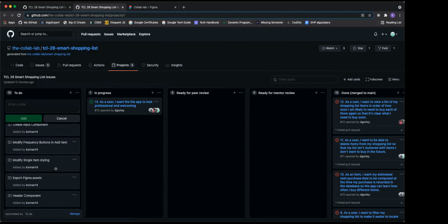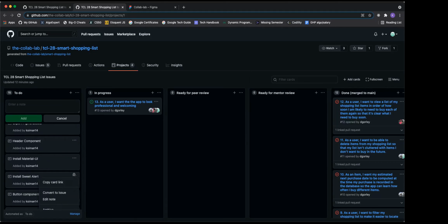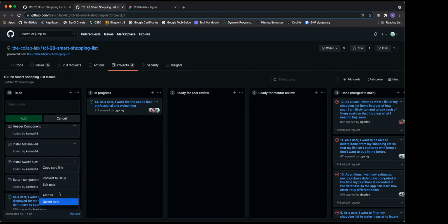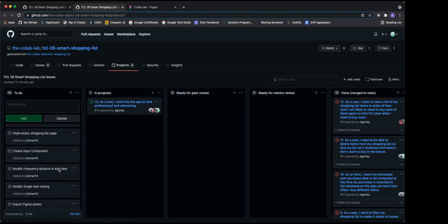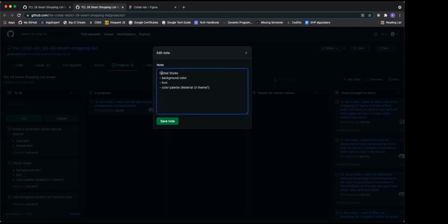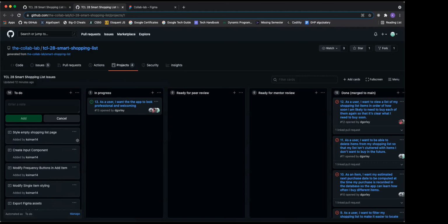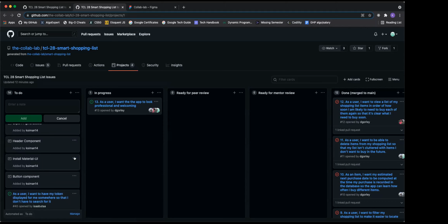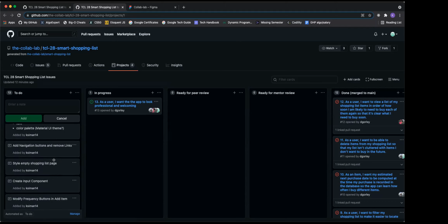And then similarly with the Material UI stuff, you could add that into the global styles, maybe. Like maybe that's the first piece. Then we have two less issues. It frees up some space. And that'll be good, because if you do that story before the component level ones, then you'll already have your color palette set up, and hopefully that'll make those ones easier.